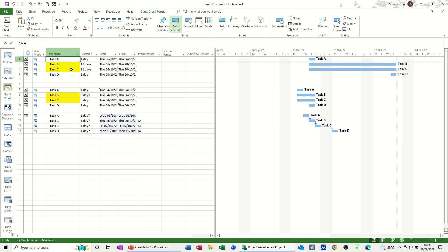This example, this could be a milestone, so could that if I'd put this to zero and that to zero. And then you've got two milestones. These things have to be done within those milestones, but not in any particular order.